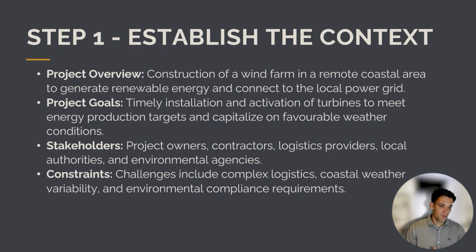So we've got an overview of the project, the construction of a wind farm in a remote coastal area to generate renewable energy. The goal of the project is the timely installation and activation of turbines to meet energy production targets and capitalize on favorable weather conditions. Stakeholders, we've got the project owner, the contractor, logistics providers, local authorities and environmental agencies, and the constraints. So we've got challenges include complex logistical issues, weather variability, and environmental compliance.